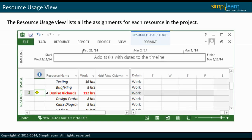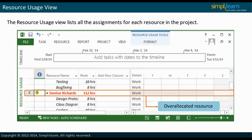The Resource Usage view lists all the assignments for each resource in a project. The project manager can view the workload or the number of hours assigned to resources during any period. Resource allocation and availability can also be checked from the Resource Usage view. This will show the number of hours allocated to a work resource along with the allocated tasks. Unassigned tasks are also listed in this sheet. Resources that are over-allocated are highlighted in red and also have a yellow diamond with a red exclamation in the Indicator field.